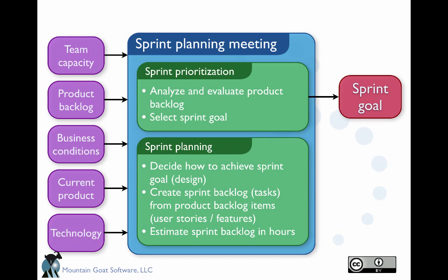That is, you define, okay, what exactly does it mean we have to do to achieve this goal, to make the tutorial playable or something like that. That means you take the user stories, the features from the backlog that you think bind together towards this goal. You have a look at them in terms of what concrete tasks by individual people that involves. That's your sprint backlog, the to-do list for that sprint.